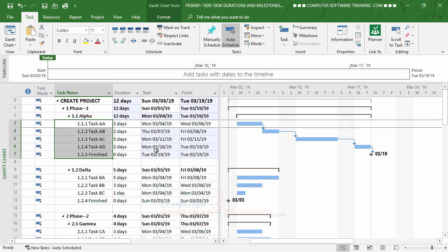The problem with that is that by putting the data in yourself, you're establishing what are called constraints on that particular task. You're putting a constraint on that task in that it won't budge, it won't move. Let's say you did it for all of these, and then later on you shorten up this particular task, maybe make it 1 day, maybe change this one to 2 days.